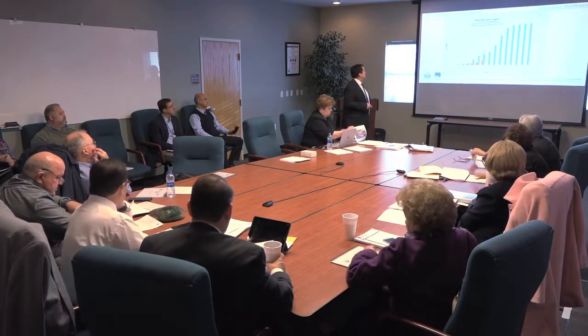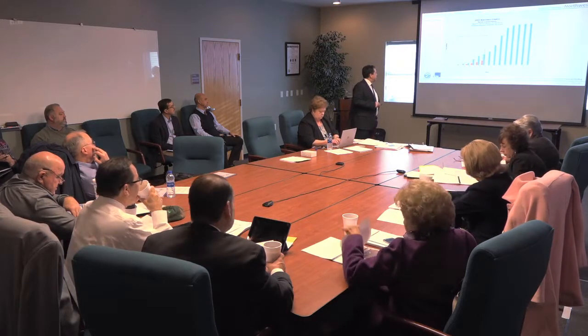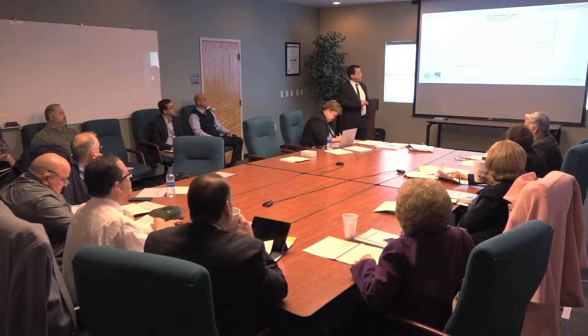It's doing very well. We spent $927,000 on that, and it should be more at $1 million. And the reason for that, there's a big gap in here, it's simple from the standpoint that we thought, actually, this is fairly consistent across all the projects. We thought that, obviously, the December time period, but also in terms of concrete. They are about to do a lot of concrete in this project, so we feel confident that this gap here will start closing.